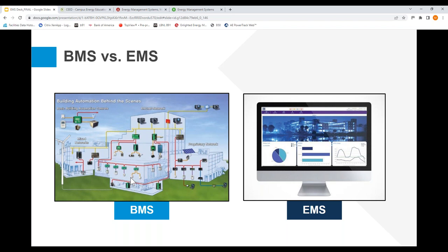So there's definitely some effort already in the design phase, but when you get into construction, generally every piece of major equipment will have its own controller. And then all those controllers need to go up to a master controller. For the most part, even still today, most things are hardwired. So there's a lot of wiring that has to occur to get all these things communicating with each other. And then of course, even if we are using a manufacturer's piece of equipment, there's generally at least some level of programming.